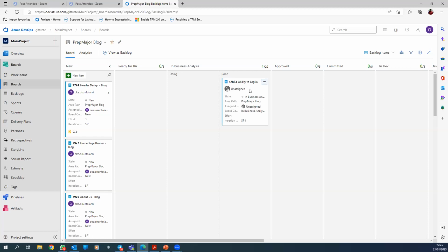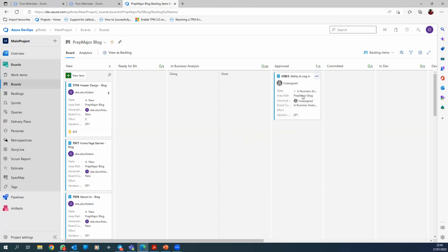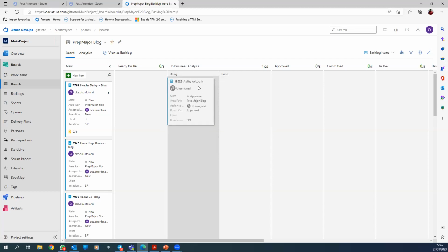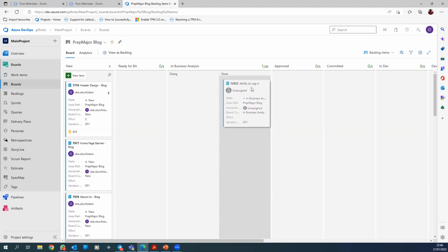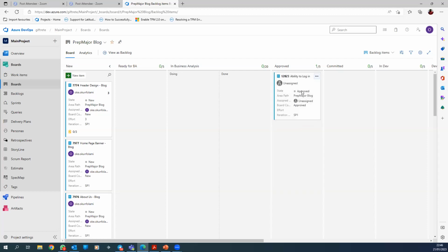You have your conversation with the product owner, and they say it's fine, it's perfect. You've captured everything, and then you move it to approved. So when you're going for sprint planning, your stories should actually be in approved. Now, in Blue Sky, I don't remember us doing a sprint refinement meeting. However, where I work, it will probably be done. Then when you have discussed with the PO, you probably put it in done or something, and then approved. But when you are getting to time for your sprint planning, your stories should already be in approved.